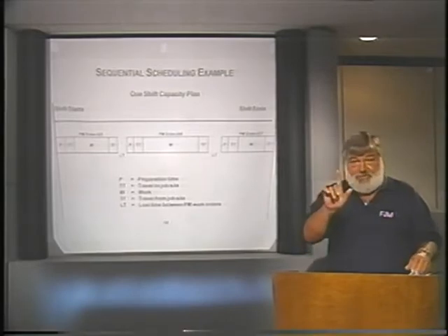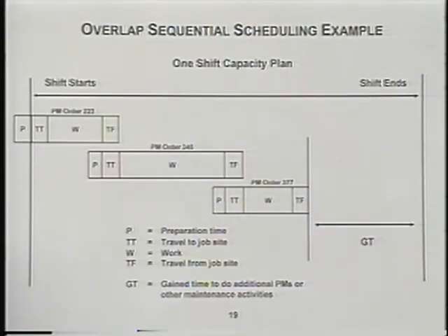developed for you on page 19. This is what we call sequential overlap scheduling. I've taken the same three orders on page number 18. If you want to measure them with a ruler or whatever, you'll see they're the same time elements, except what I've done is I'm overlapping those non-productive or non-wrench time times. So for the first order, you notice that P is to the left of the starting time. That means that the storeroom actually had that order prepared the day in advance. And that is part of the planning of the storeroom. The individual that's going to perform that particular PM will get his or her material and travel to the job